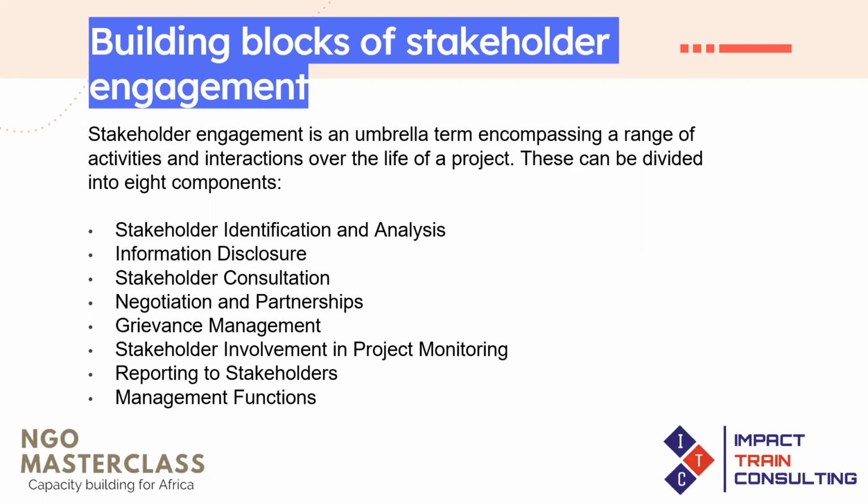The other component of stakeholder engagement involves grievance management. So here, you're going to be able to establish accessible and responsive means for stakeholders to raise their concerns. Okay, so you're going to have what we call complaints and feedback or complaints response mechanisms, whereby stakeholders are able to share with you the challenges that they are facing on that project, and you will now be able to respond.